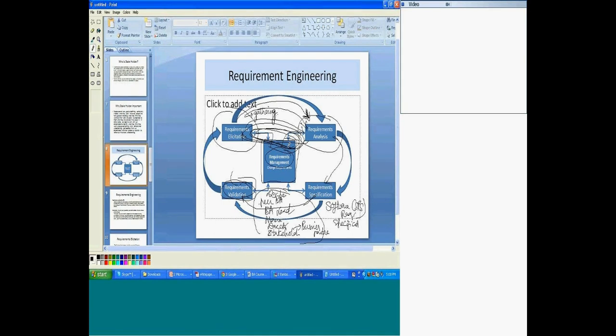We have different tools for it, such as a relational repository, where you can manage all the requirements, note down how each requirement connects to the other requirements, and have traceability. Say requirement 1 is dependent on requirement 2. If requirement 2 suddenly changes, then obviously you need to point to requirement 1 and update it accordingly.